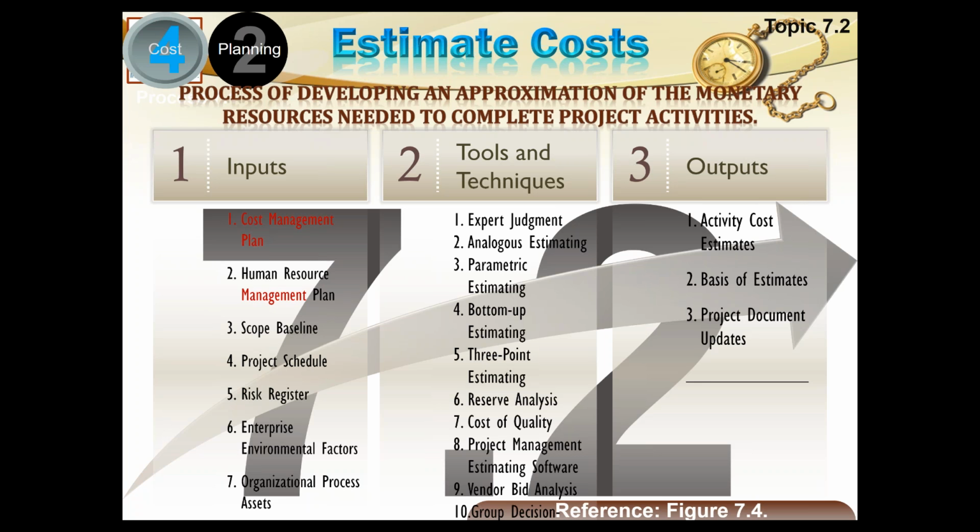This gives us more accurate flexibilities. How you say this job can be done in 500 rupees, but people are there who claim that they have done it in 200 rupees, and people are there who claim that it can only be done in 700 rupees. So there is a range available. Although I will give more weightage to the most likely value, the middle value, but at the same time, this estimate will be corrected according to that.